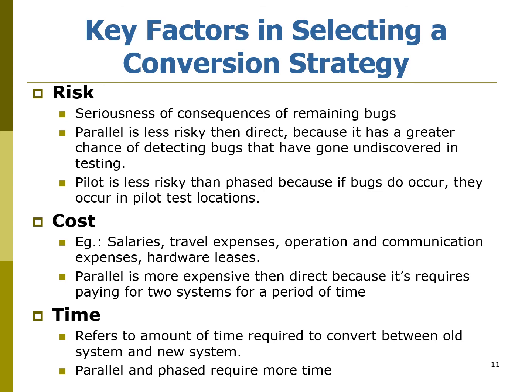And the third factor is time. Okay, how much time do you have? Okay, if you have longer time, maybe you can use phased or parallel. But if you don't have enough time, maybe the best option that you can select is actually direct. All right.